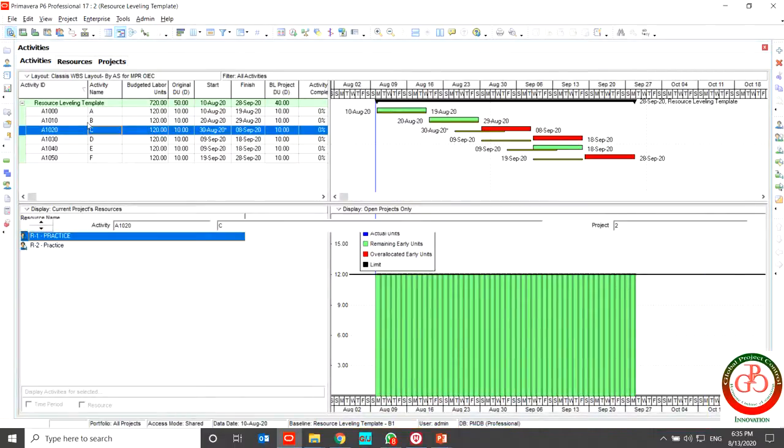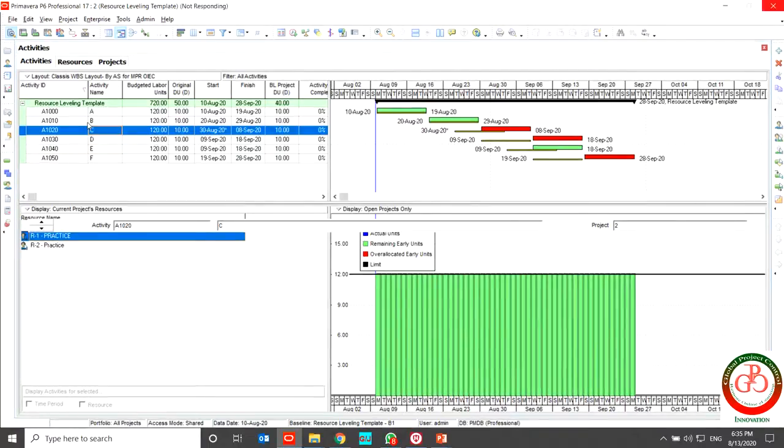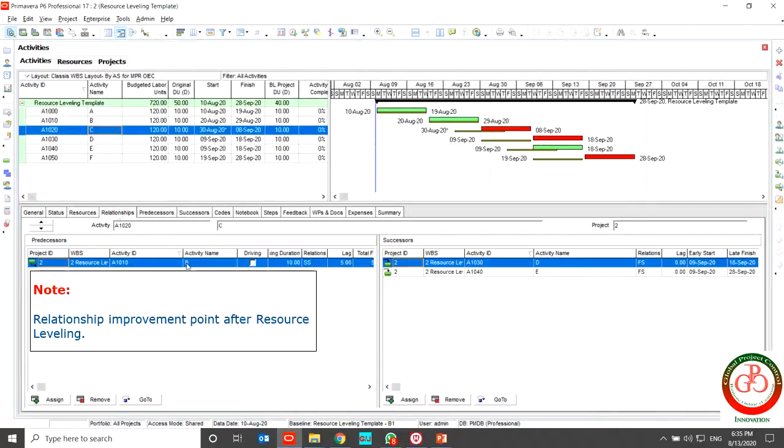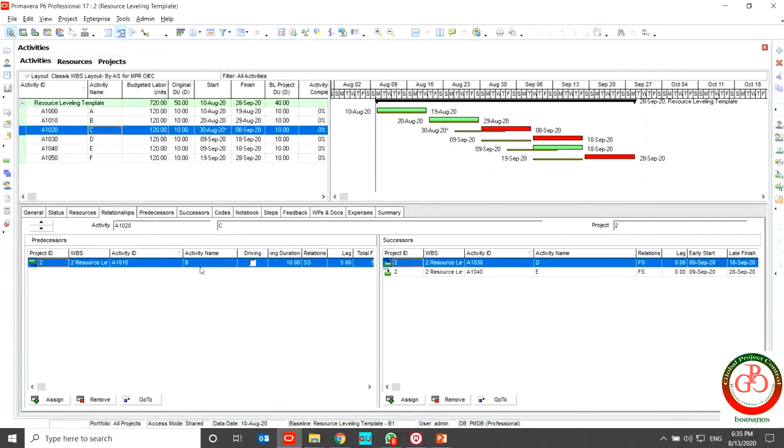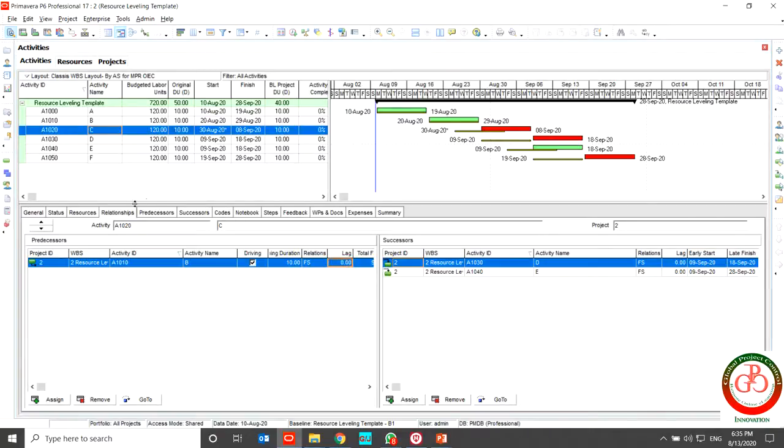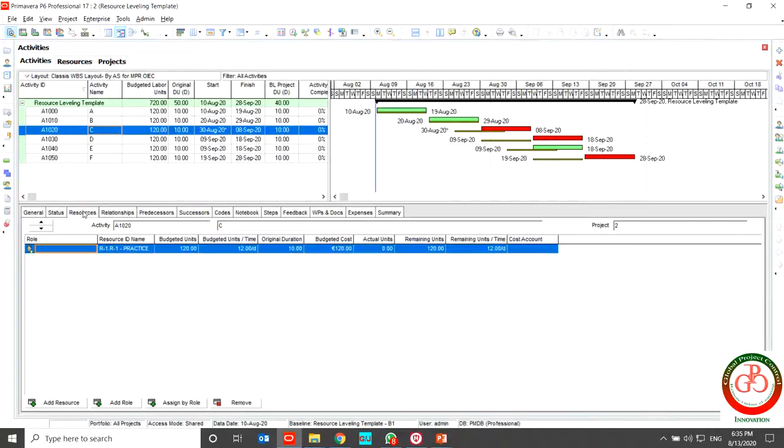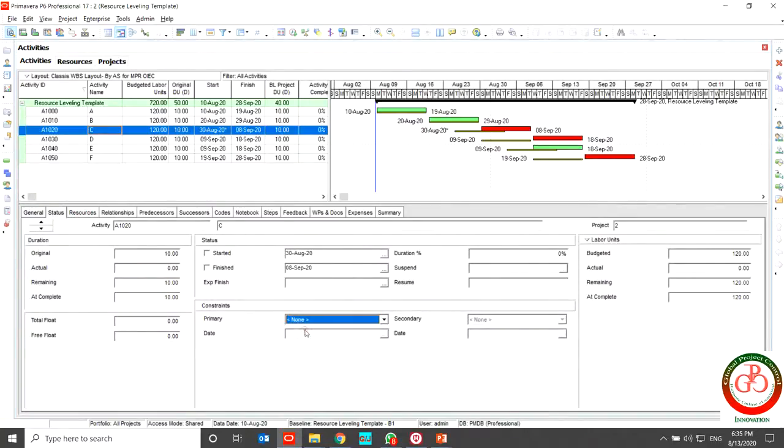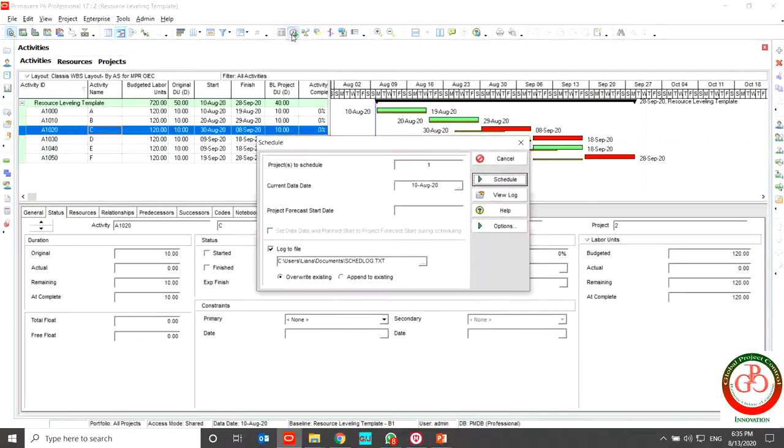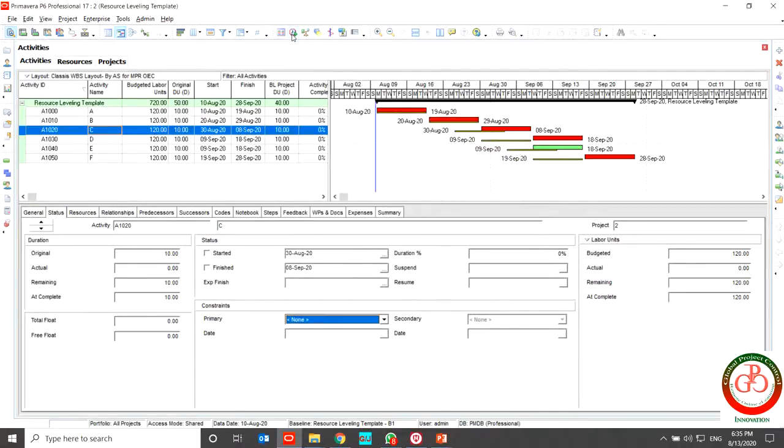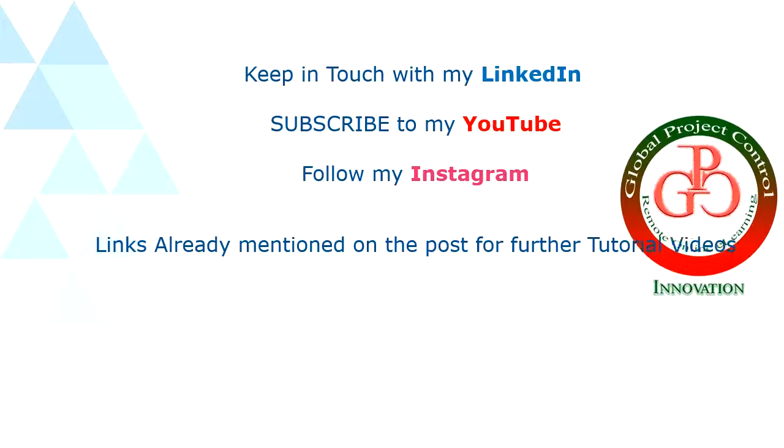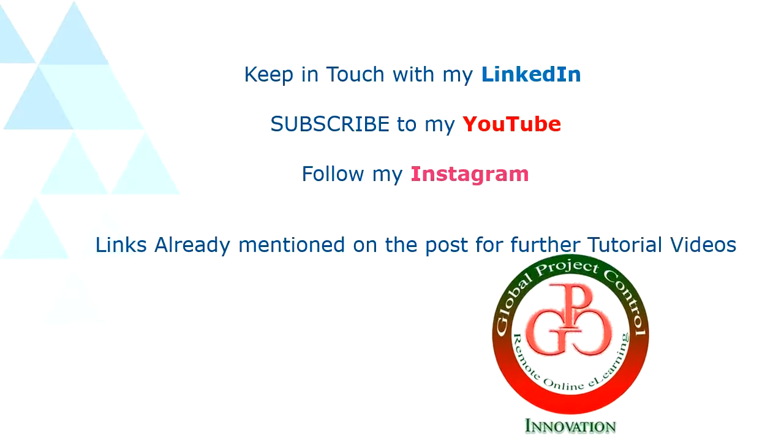And if I want to have a better relationship between my activities I should change this relationship. This relationship should change to finish to start without any lag. And in order to do this change I can remove the constraint in my project. And if I schedule again my critical path that included all of my project. I hope this lesson would be useful for you.